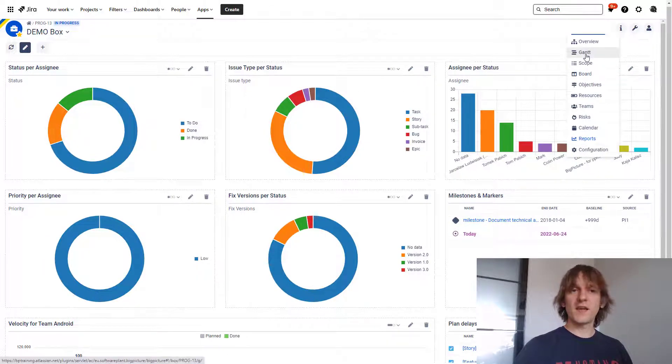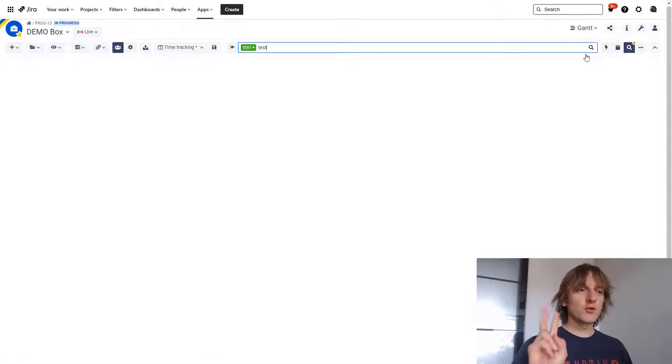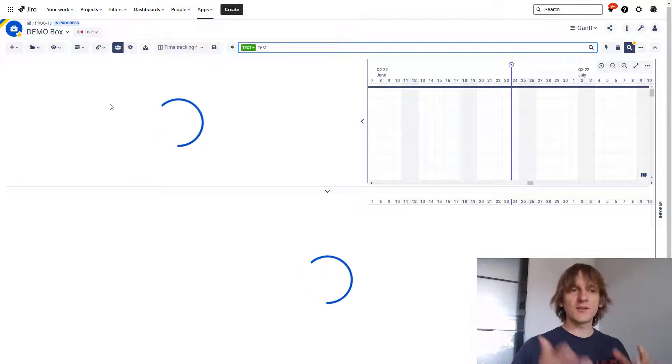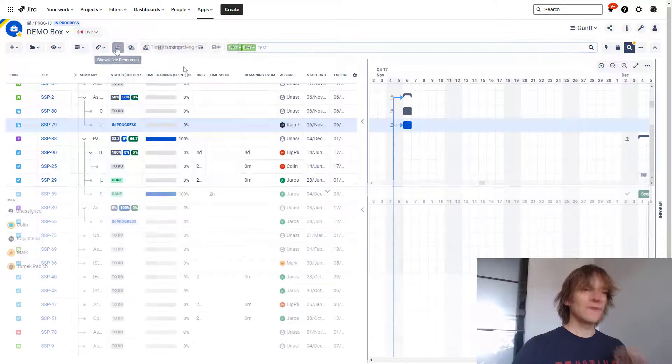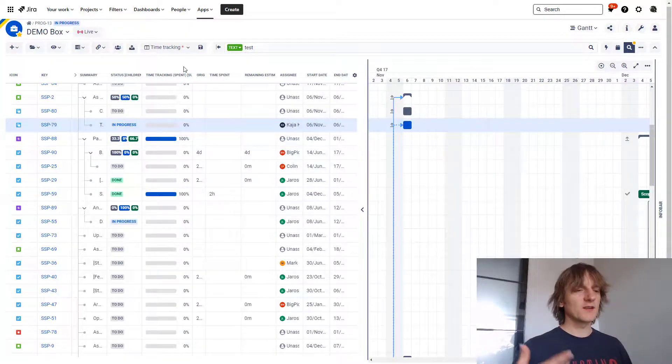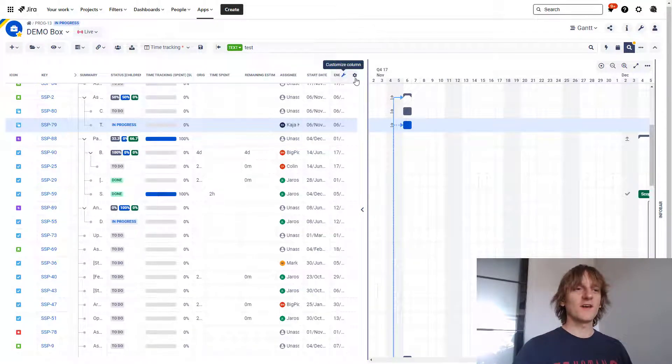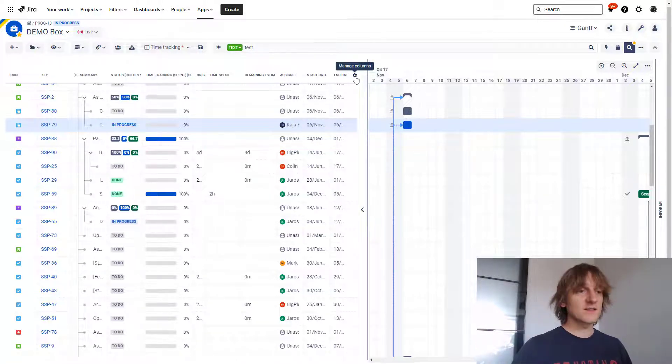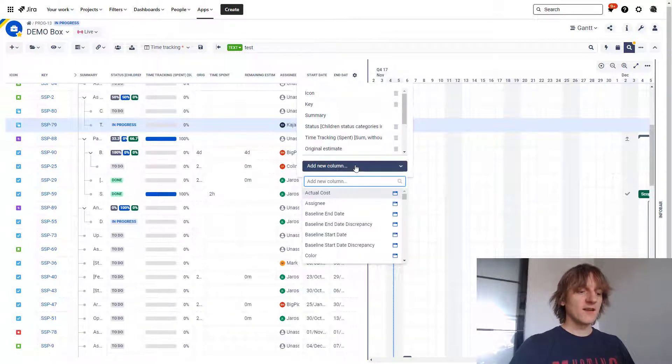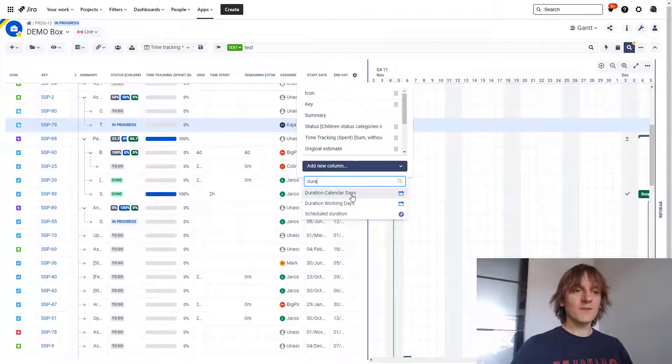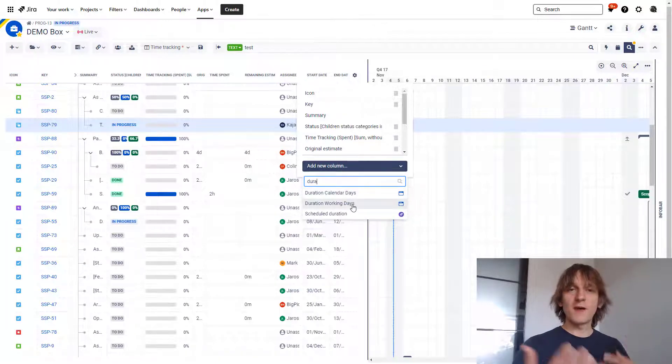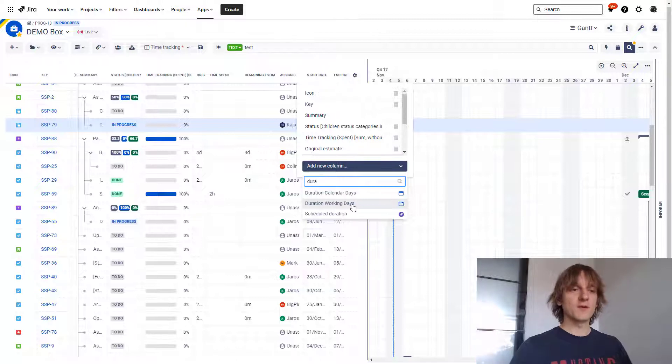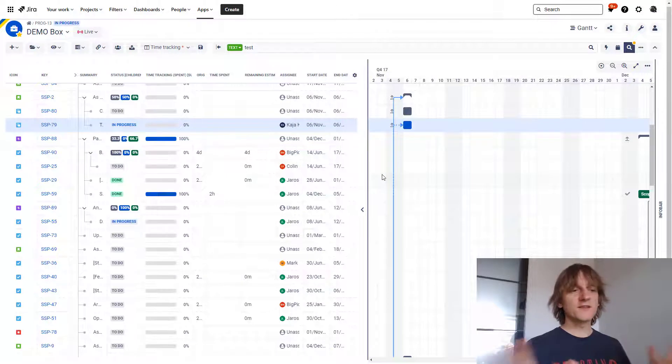Something that might be of big interest to some of you is that two new fields have been added that we can now use, for example, in the Gantt or in the scope module as additional fields. And I know from all the consulting that we're doing in the training that there are people that have been asking for it for a long time. It's especially useful for those of you that are migrating from Microsoft Project, because you might be used to having them. But I think it's super useful for everyone. And the fields I have in mind are duration in calendar days and duration in working days. So now you can have both of those values available over here. One or another might be, or both of them might be very useful to some of you, I'm pretty sure.